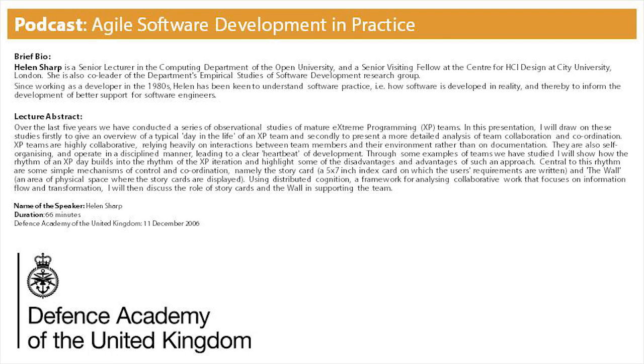If a manager is involved, then they tend to hold the development overview. So they have a higher level view, which again will feed into some of this other stuff that's going on to get stories. And the whole purpose for this is to choose stories for the next phase. So phase is either iteration, but you also have a planning game for the release. I said I wouldn't talk about the release, but just to clarify, you have a planning game for release, and you have a planning game for iteration.